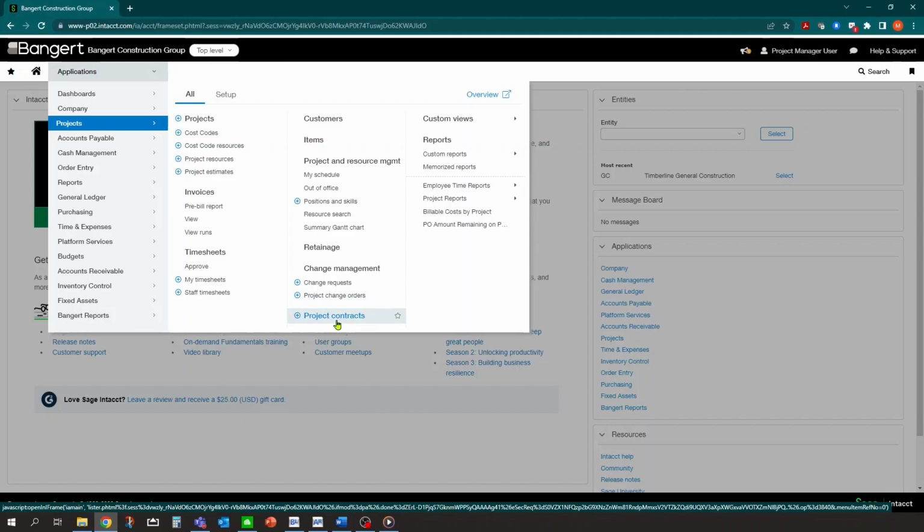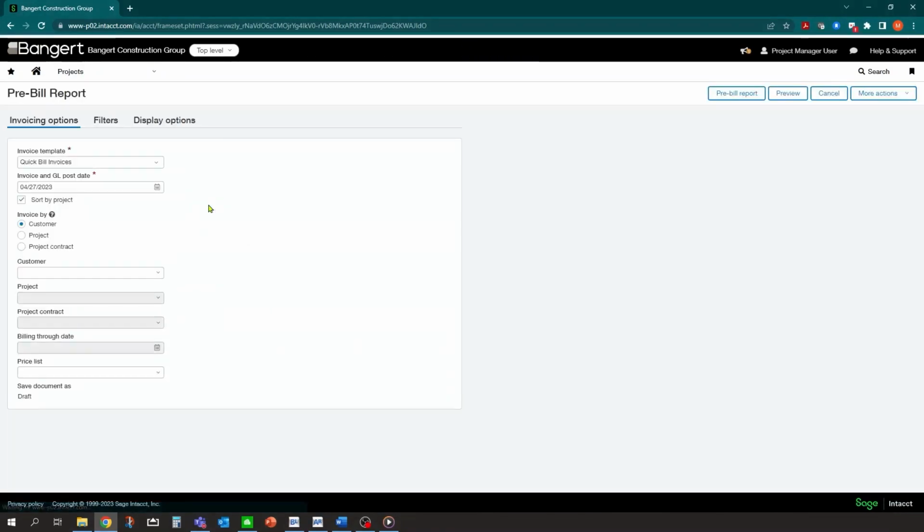the project. Okay. And with that being said, they also have the ability to do what's called a pre-bill report, which basically allows them to go in and generate your percents to bill for a particular contract and get that typical AIA type or actually a time and material type billing generated through projects that can be handed off to accounting.